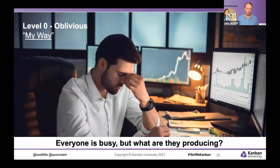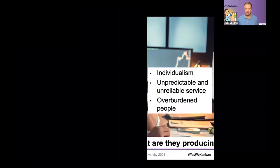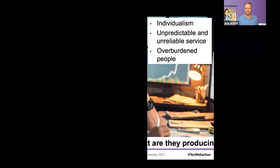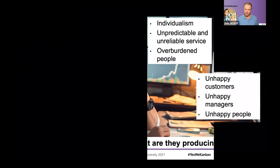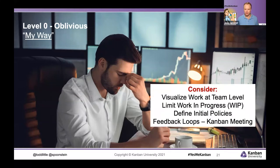When looking at maturity levels, at the lowest level — oblivious — you tend to find a 'my way' mindset. Everyone's busy but no one knows what they're actually working on. This results in individuals having ownership that's only theirs, unpredictable and unreliable service, and people who are typically overburdened — leading to unhappy customers and unhappy managers. Solutions include visualizing work at the team level, limiting work in progress, defining some policies to get started, and having conversations through feedback groups like the Kanban meeting.